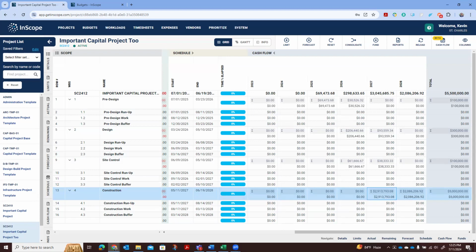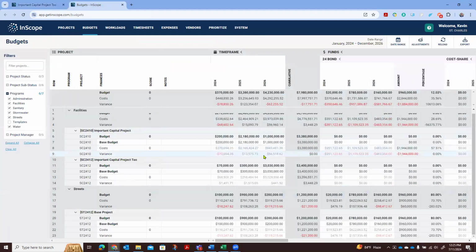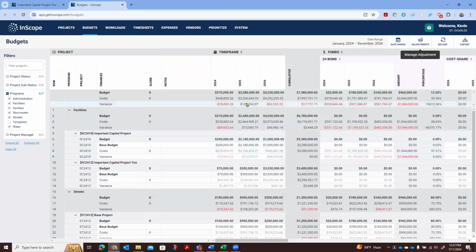Obviously, there have to be some financial controls in place, but the whole point is, if you can sell your finance departments on an approach like this, where you budget around cash flow and you get better at predicting cash flow or costs over time, then you get better pictures of when budgets are actually going to be utilized. And then if I have a surplus in my budget, I have a better idea that, okay, maybe I can get more initiatives started.